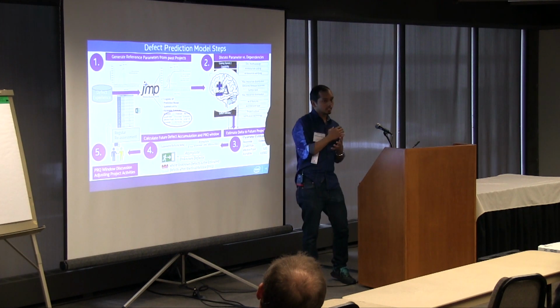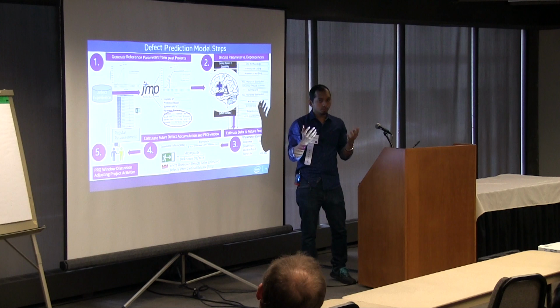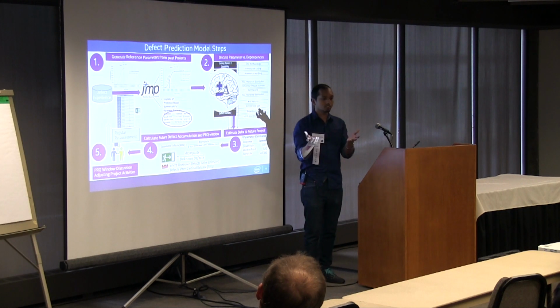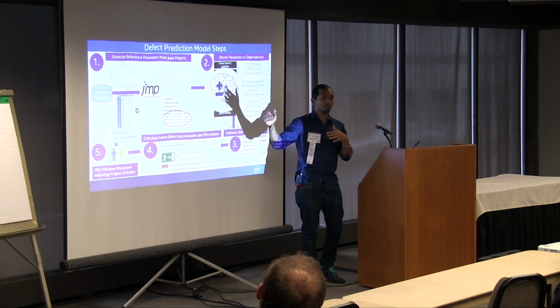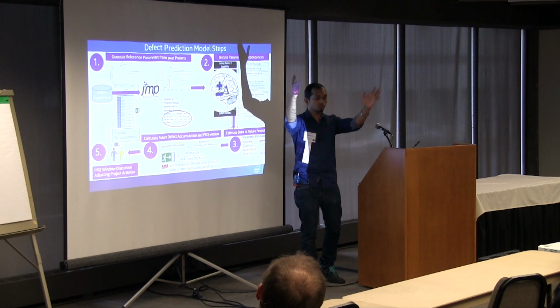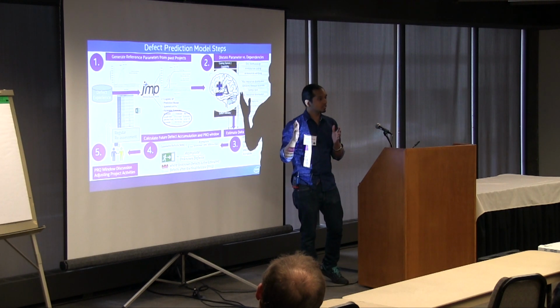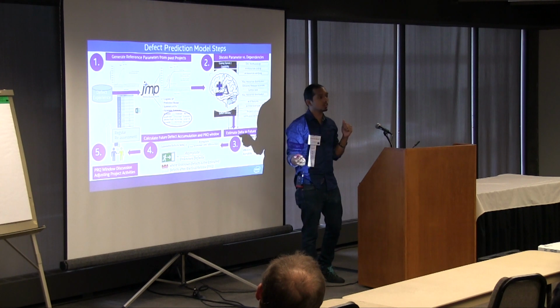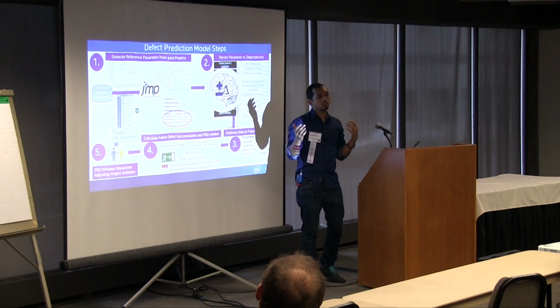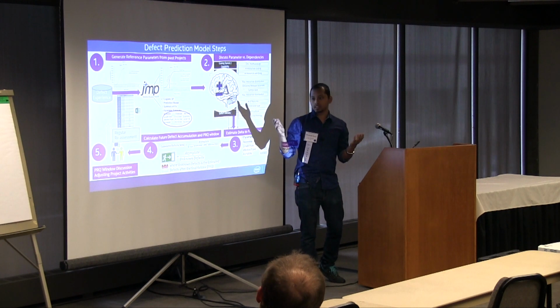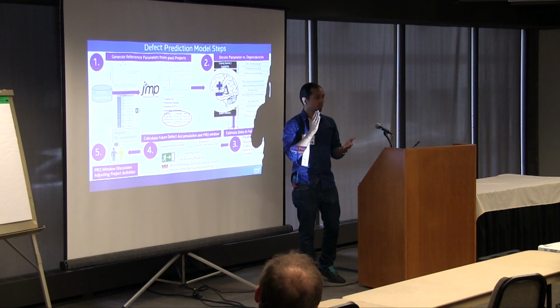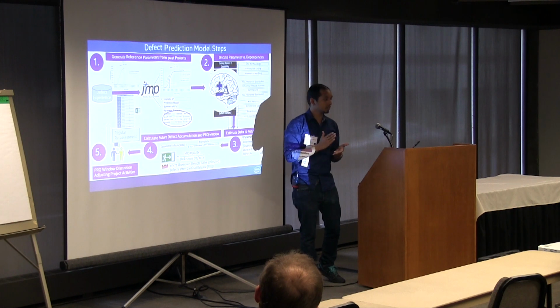Once you have that estimate, you plot it in, and because this is a completely new project, say 1 year down the line, you just have a trend. Then you plug in your future milestones and see whether those milestones are syncing up with your expectations. Say, for example, you planned that next fall, say October, before people go to school, I want my PRQ.